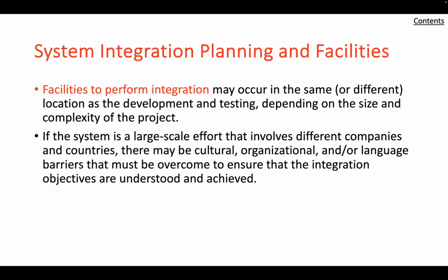Determining the most effective order of assembly and selecting the optimum test intervals are critical to minimize the effort and time needed to accomplish the integration process. Since both system level knowledge and system expertise are essential in the definition of this task, the task is normally assigned to a special task team comprised of system engineers and test specialists.